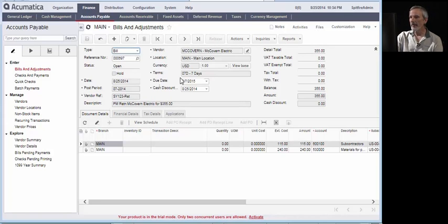Look at the due date on that. That's the September 7th, 2015 date that we entered on his commitment earlier. Retention is paid near the end of the commitment when we know all of his work is completed to our satisfaction. It's a liability right now that will be held in the system, but not due until the end. So there we go. We've just paid a subcontractor his deposit, including the retention, creating both of the vouchers in Acumatica by doing the entry and the approval work in Spitfire.